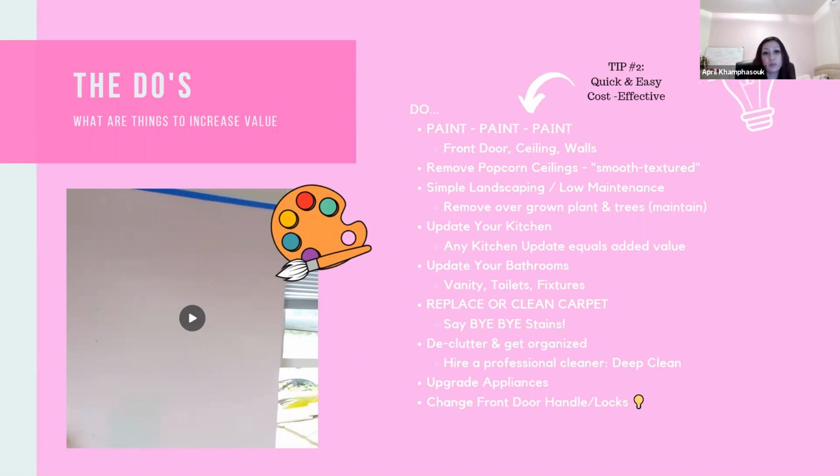The rule of thumb is I always just do a quick math. Let's say there's a house, I base it on the square footage. I would do between $25 to $45 a square foot. That's how I come up with easy math on how much renovation I would put into a house, even without going out to see it, based on location. If the location is in a high-end area, I'm looking at like $40 to $45 a square foot. If I'm looking at a house that's just the normal first-time home buyer or resale price point, in the $400,000 to $500,000 range, then I'll probably lean towards $25 to $30 a square foot.